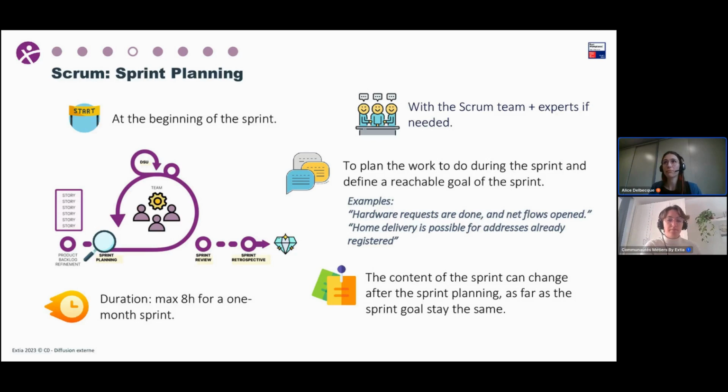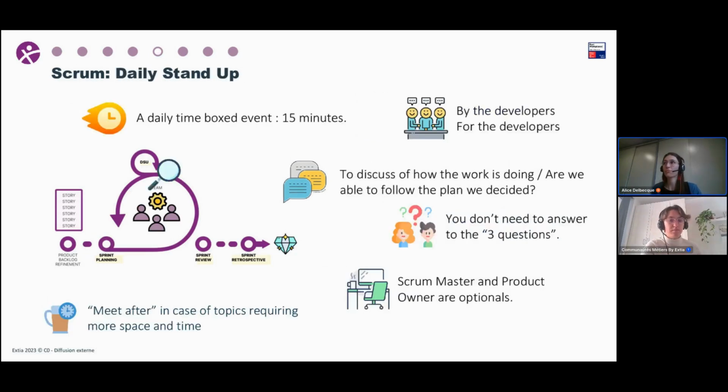So every day at the same time, they will meet each other to discuss how the work is going. And this is what we call the daily stand-up, or you can just call it the daily. The daily stand-up is just 15 minutes, no more. It's really important, because sometimes you can see some teams who say that they have one hour of daily every day, and so they are complaining that they have too many meetings. But indeed, if they are not respecting the time of the event, of course, they will spend a lot of time in meetings.